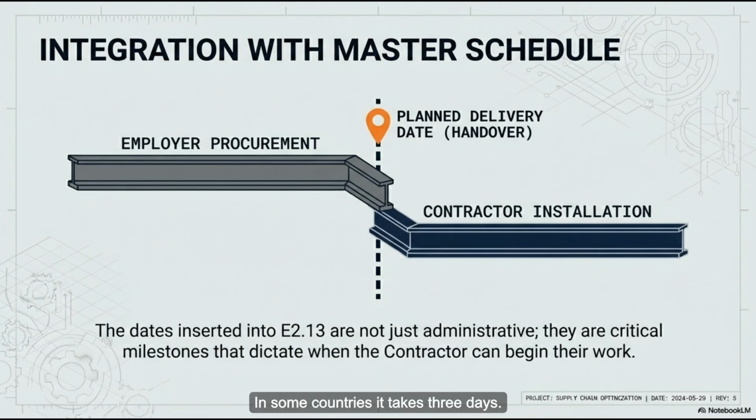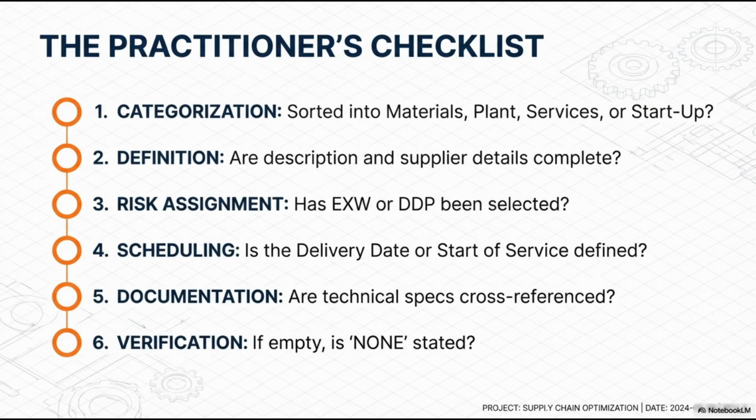In some countries, it takes 3 days. In others, it takes 3 months of stamps and bribes. That is why you simply cannot just copy-paste this document from one project to another. The foundational logic holds, but the actual liabilities shift entirely based on the geography.